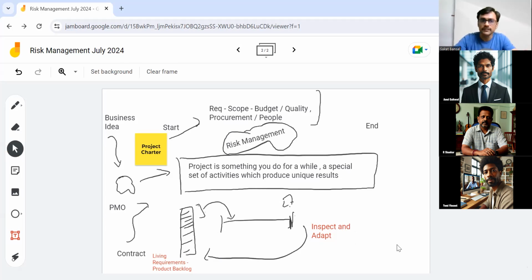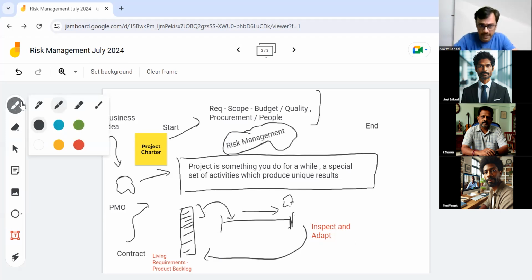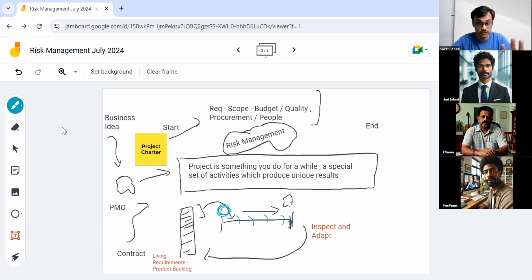But whatever technique we run, we may need risk management first to ensure that we are going as per plan inside the iteration or a sprint. So when we do small time box planning in our iteration planning meeting, we need to identify what possibly can go wrong and track that throughout the iteration. When we talk about what can go wrong, we are focusing on the current iteration. We have these two weeks, this is the goal we are taking, and if something can go wrong, we need to change our direction. So we need to plan for that. We plan it in the iteration planning meeting, we discuss it in the daily stand up, and once the iteration is over, we may do a retrospective about our risk management approach. That's something we do continuously.